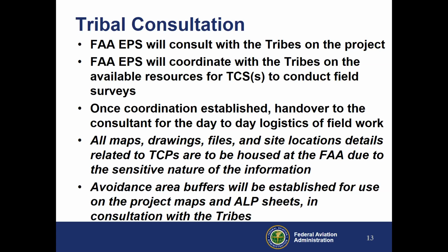And it is the FAA's environmental protection specialist's responsibility to consult with the tribes on the project because it is a government-to-government relationship. And we will also coordinate with the tribes on the available resources for the traditional cultural specialists to conduct the field surveys and construction monitoring.